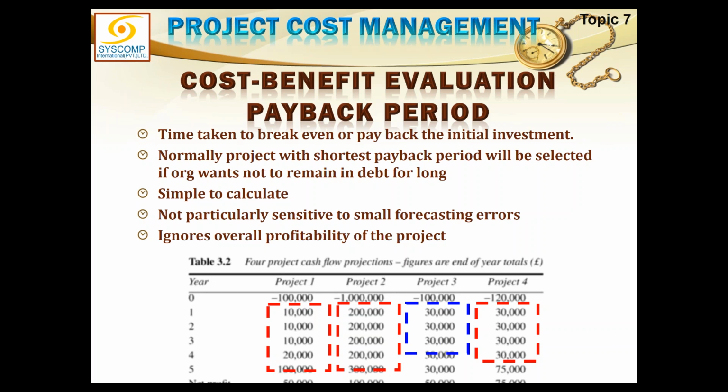Why do we decide sometimes on the payback period? There must be certain situations where I am more oriented towards the payback period method of cost benefit analysis. That would be when you have started your business taking a loan from the bank. If you do not pay back the loan, the interest will keep increasing.